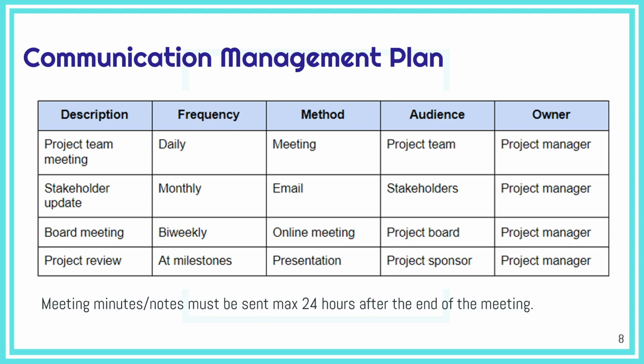a waterfall project, where you as a project manager define what the communications in your project will be, like meetings or maybe reporting, emails, phone calls, etc. Their frequency, and you need to state the day and time when each communication will take place, the method, is it a meeting, is it an online conference, is it a presentation, an email reporting, etc.